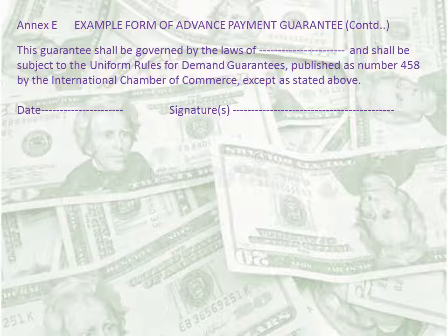If the guarantee has an expiry date and the advance payment has not been repaid 28 days prior to that date, as we discussed, the contractor must extend the validity of the guarantee until the advance payment has been repaid. Further, the expiry date should take into account the possible delays to completion. Where the contractor fails to extend the guarantee, the employer may use it for the unpaid balance. The given 28 days is to allow the employer a reasonable period to make the necessary arrangements for that.